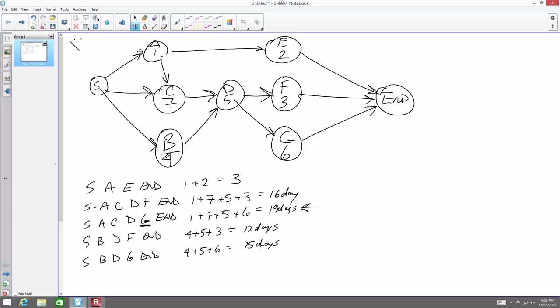Time is of the essence. You see that in every contract that exists; I've never seen one that doesn't have it. You have that in there so that if there is a delay, you can get compensated for it. So it would be answer C there. Damages for delay cannot be claimed if time is of the essence is not in the contract. So you want it in there so you can get reimbursed for damages due to delays. Delays not caused by you, of course, but it's a very, very important part of a contract.